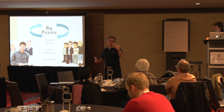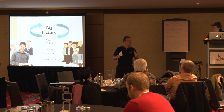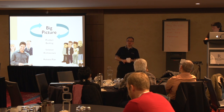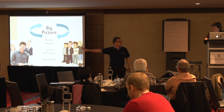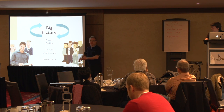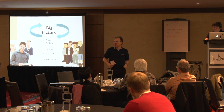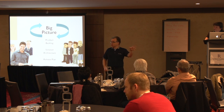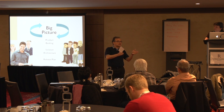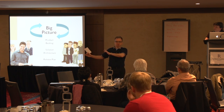This is part of the principle of synchronizing movements. The product owner comes prepared for the big picture discussion — no waffling. The team comes understanding we're working at a high level; this is not a firm commitment. It's okay to estimate based on loose requirements because there's an opportunity later to do a refined commitment-points estimate. It's the dance around the breadth of the product backlog and the likely solution architecture. The output is your classic release plan: scoped story points, selected stories, high-priority stories mapped to early sprints.